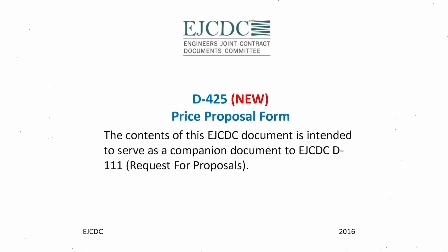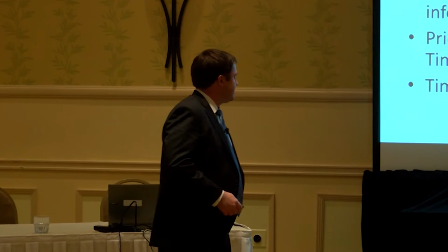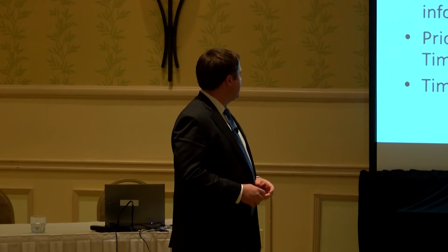The way the form's set up is that when they submit it, the bids must stay open for 60 days. The design builder must verify that it's visited the site and is familiar with the general and local conditions. The design builder has a reasonable right to rely on information provided by the owner. There's pricing options based on a lump sum, unit price, price plus time, and the cost plus fee.